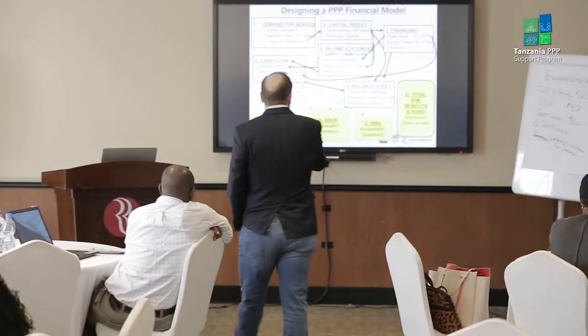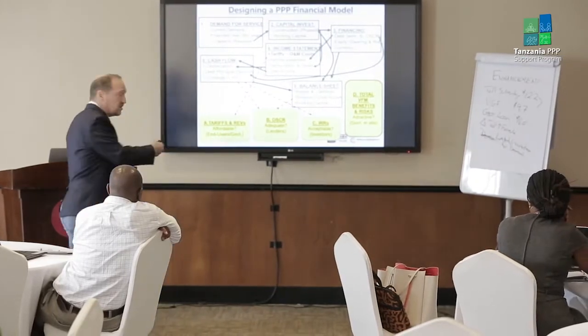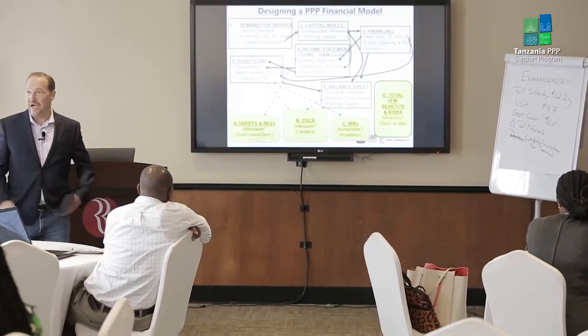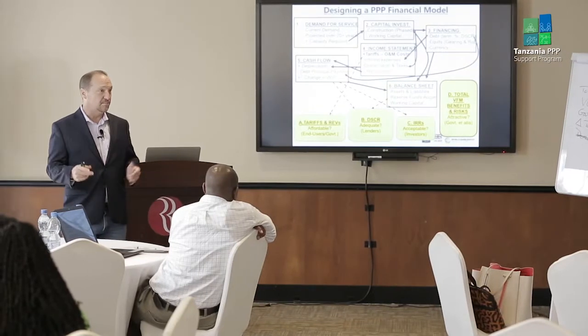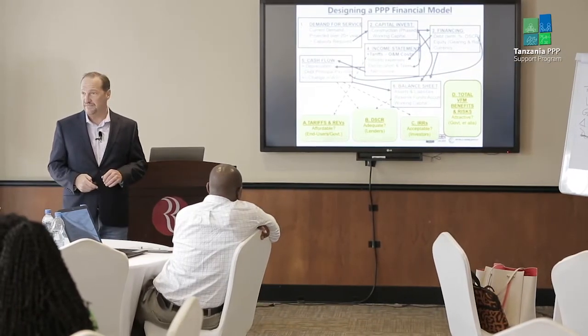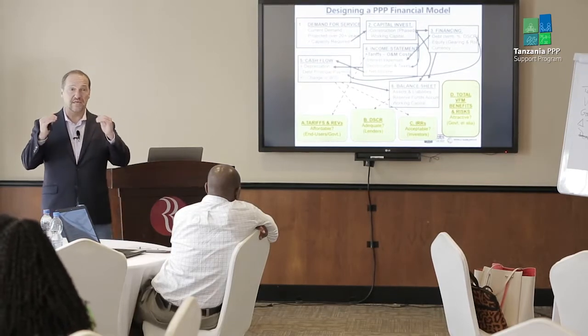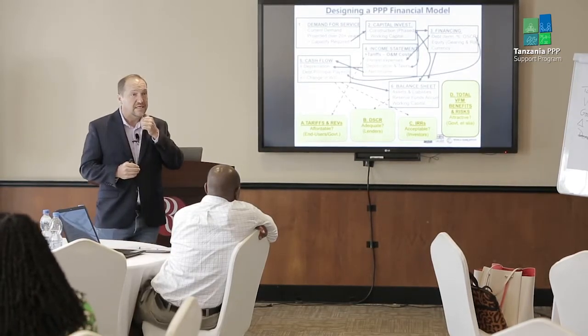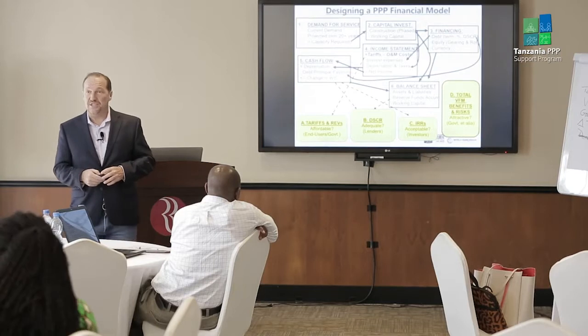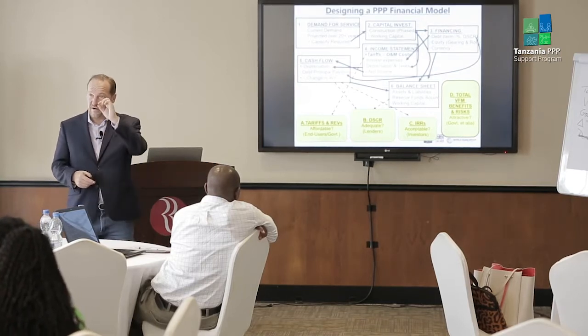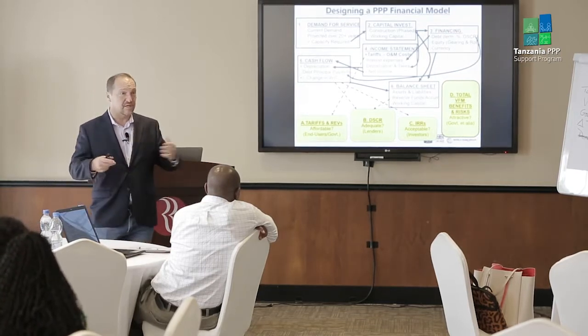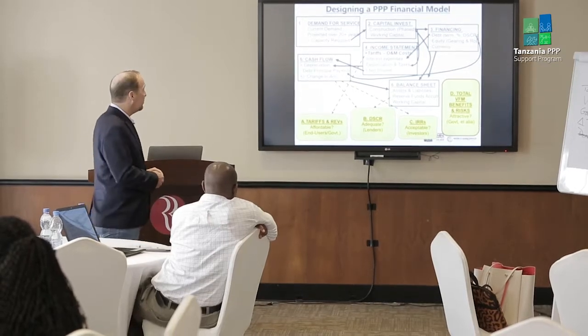Level of demand determines the capacity required, which determines the capital investment. How big of a facility are we going to need to build to meet that demand? And we said that the capital investment, that's oftentimes where you get a lot of input data, especially from your engineers and cost consultants, on all the individual line items that go into construction and startup.